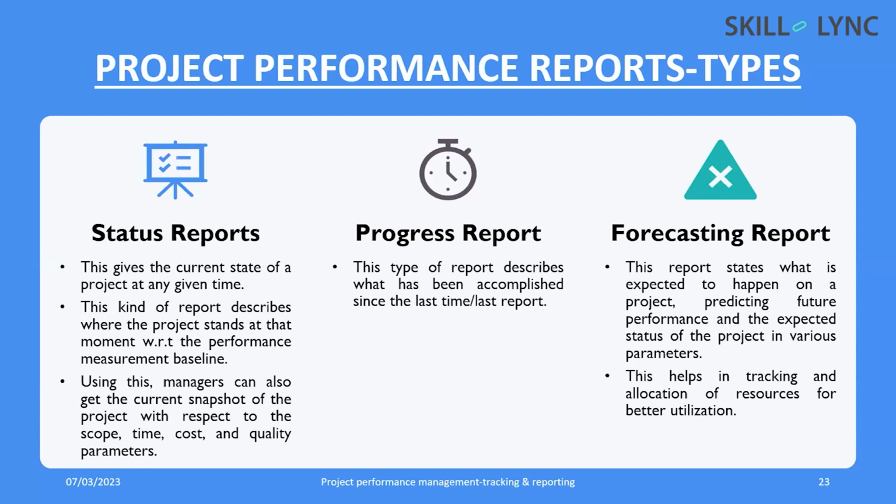With the help of this report, the project managers can also get the current snapshot of the project with respect to the scope, time, cost and quality parameters. If we are preparing the status report, for example, we can take the construction of a villa. We are doing the monitoring this month, and we will understand the actual state of the project. As per the baseline, we will compare whether it is lagging or leading. What is the state of the cost? What is the state of the schedule? This will give the project manager a clear picture of the current status. That report is known as status report.